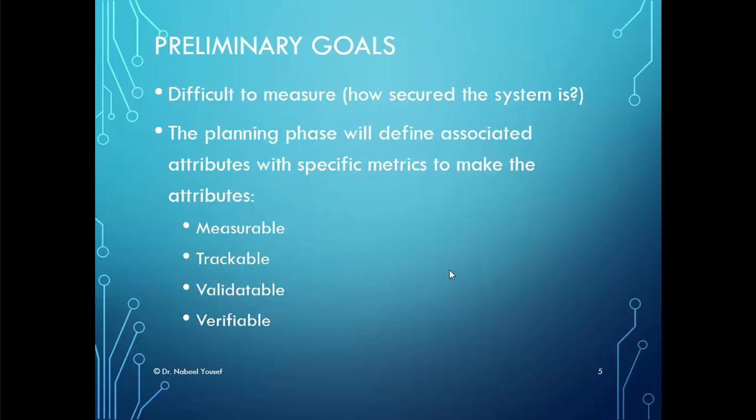Some goals or characteristics are hard to measure. As a result, associated attributes will be defined with specific metrics to make sure that the attribute is measurable, trackable, validatable, and verifiable. A measurable attribute has a well-defined metric and a methodology to confirm it has been implemented correctly. Trackable means the ability to keep track of measurements taken for a specific attribute. Validatable means comparing the stated goal with the actual measured goal to ensure it matches what the customer specified. Verifiable means ensuring that measurements of an attribute or goal are properly recorded through repetition, tracing, or other means.